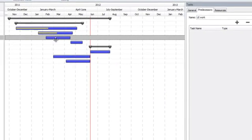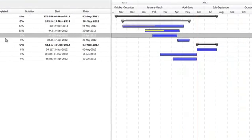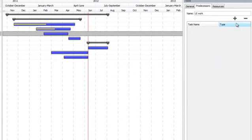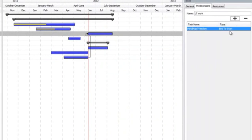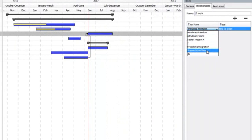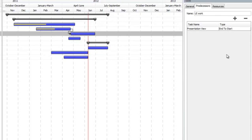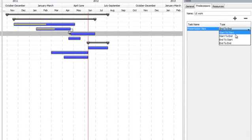But potentially, this task could be reliant on the end of the presentation view, for example. So let's start doing this. This presentation view is the predecessor and the default is end to start. So the end of the presentation view is the start of the presentation view.